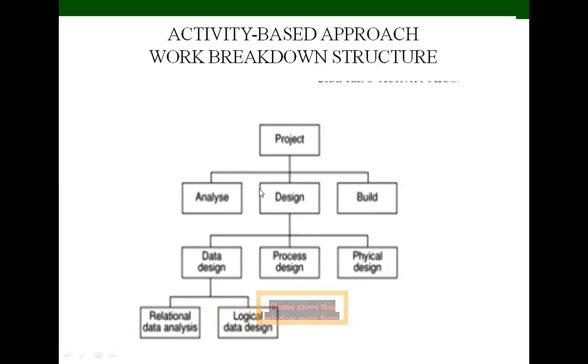See here the figure below. The figure shows a fragment of a work breakdown structure, where the project is divided into analyze, design, and build. Design is categorized into data design, process design, and physical design. Again, data design is classified into relational analysis, database analysis, data analysis, and logical data design. So it is broken down into 3 tasks, and one of them is divided into 2 tasks.